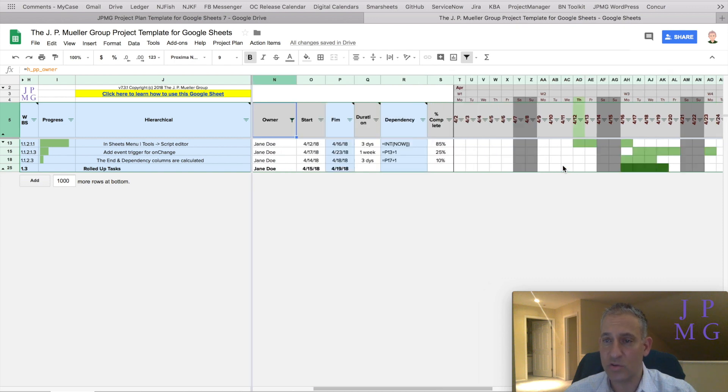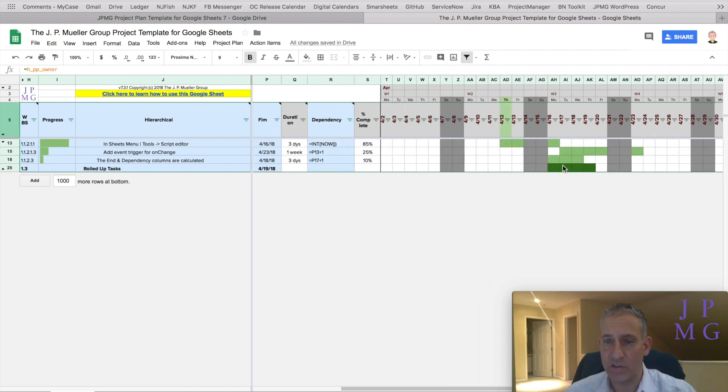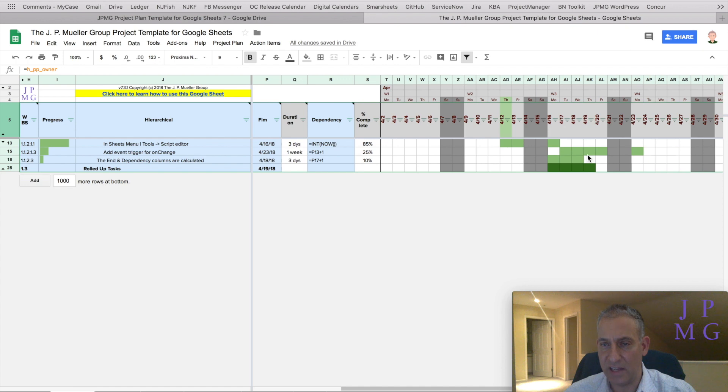I can now scroll across and see that from 4/16 to 4/19 I have multiple tasks for Jane to be doing.